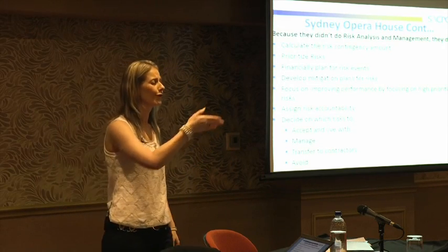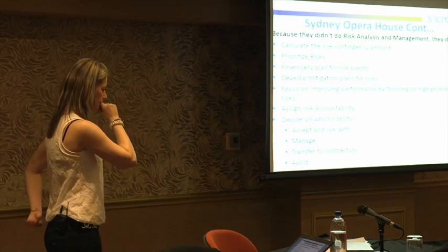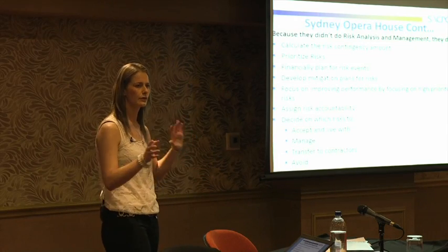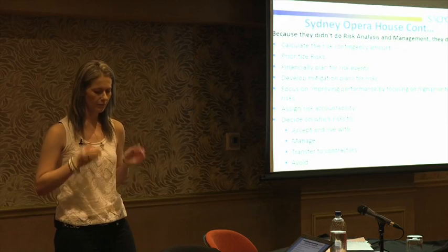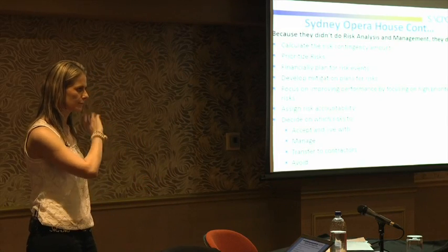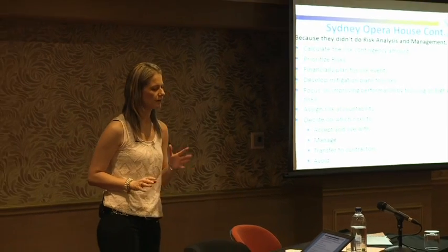And very important, who's going to make the decision at that point in time, and who's the risk owner and who's going to deal with it. Because we don't want to run around at the last moment thinking, oh, who's going to look at it and who's going to do what. We need to know everything before it happens. Because if it happens, it's no longer the risk. It's an issue. It's materialized. You're going to have an impact. The scary thing is you don't always know to what extent.